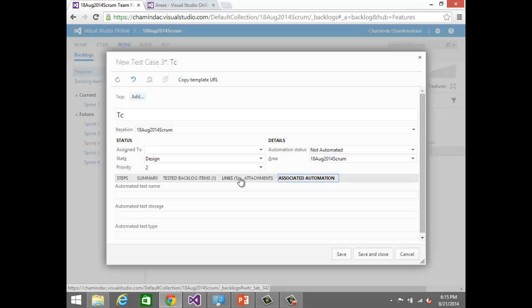Now some bugs, those are not bugs, but you are referring to a different requirement, so it should be a change request. So a bug can be raised by the client, so we will be saying this is obsolete or this is not a bug or something like that, and we may be closing that, but we will be creating a related change requirement. Then a change request could be again related to what? Another requirement, right? So that's the way you should treat this level, right?